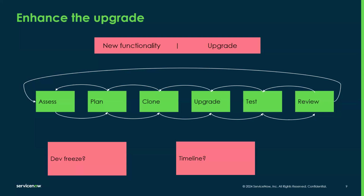I will also give an example of a customer that I had who we did have a run book for the go live or the upgrade, but the developer forgot to do the first step. So even if you have the checklist or the run book, you have to make sure that you follow it, because we spent a whole day troubleshooting what was wrong, and we finally realized that he hadn't done the first step, and I think it was activating the plugin.